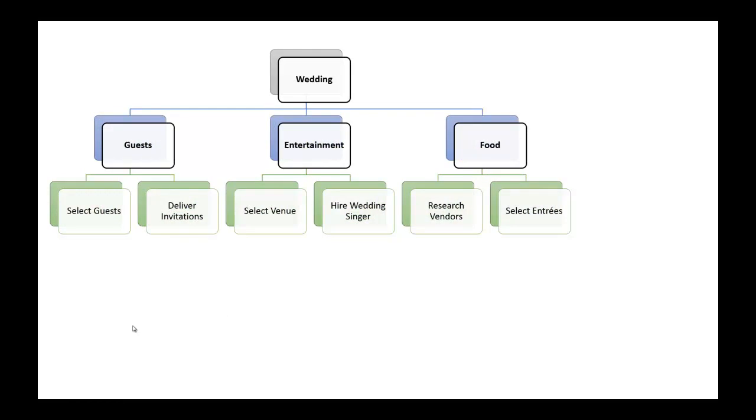And to demonstrate that, I will show you our work breakdown structure. Now, a work breakdown structure is defined as the decomposition of a larger work effort into more discrete work packages. So the WBS allows us to see what will actually be required to complete larger efforts. This is usually a foundation for a Microsoft Project file because the WBS tends to capture the entire scope of work, which a Microsoft Project schedule should be doing just that.